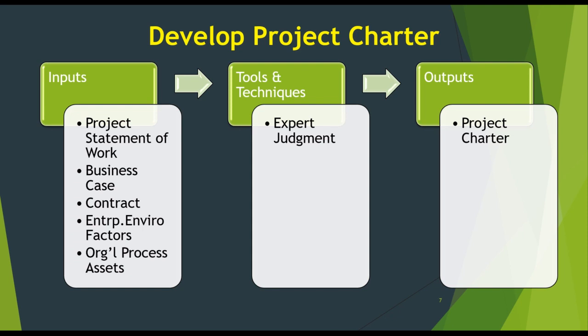The inputs for the project charter are the project statement of work, business case, contract, enterprise environmental factors, and organizational process assets. The tool and technique used for developing the project charter is expert judgment. The output is the project charter.